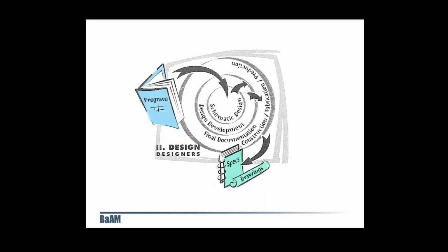Quite often, teams may use milestones that represent percentage completion, such as 50% schematic or 90% schematic. This tracks and manages the large amount of work that happens within these phases. These milestones should be determined from the outset and are an opportunity to gather feedback from all the necessary parties. Approval or sign-off for one phase of work initiates the next phase. Once the project is ready to move on, the specs or specifications and construction drawings are carried forward into the implementation phase.